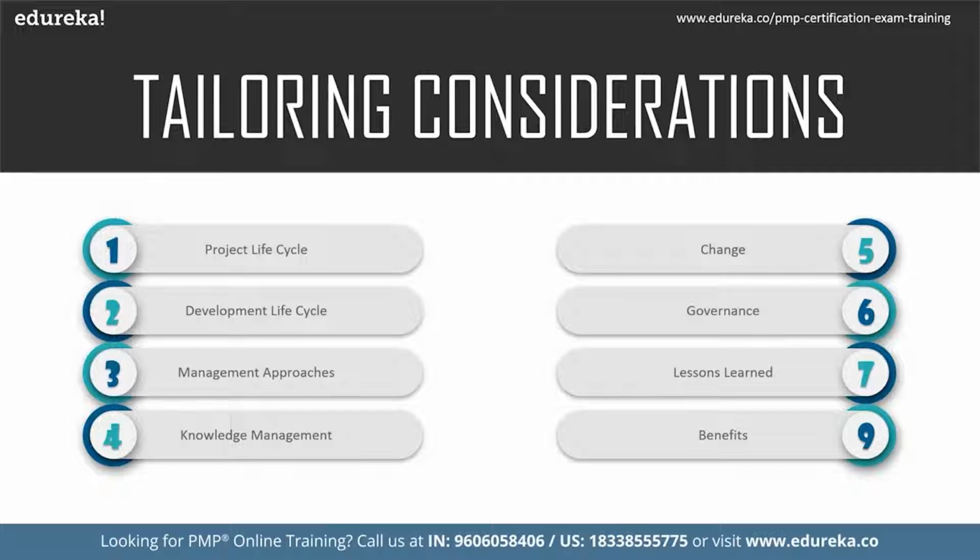Secondly, when I say change, we should also think about the change to the baselines defined for the project, which will happen while doing the projects. We should not get confused between these two changes: the project bringing a change to the environment versus the change happening to the baselines defined within the project. Both need to be handled very carefully, and both are not the same.